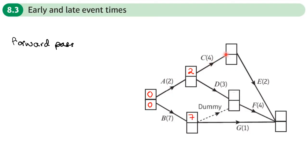For activity C, there are no other events we're waiting on, so the earliest time to finish C is six. Notice that this box represents two things: the earliest time A can finish and the earliest time C can start. That's why it's the early start and finish time — one box represents the end of one activity and the beginning of another, unless it's the source node or sink node.